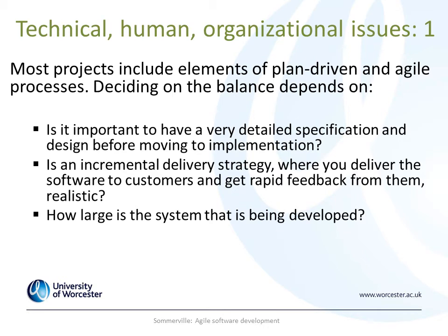So if they're in the same building, that's great. But it may not be possible for large systems that require large development teams, and a plan-driven approach may have to be used. And it definitely is going to be more complicated if you have the development teams being split on different sites or even different countries.